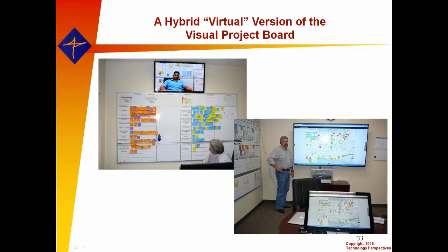I've seen some boards where even the person who set them up has no idea what everything means. So here's a simple rule of thumb. If after a week or two of using a project board, anyone on the team has to ask the question, what color of Post-it are we using for that, it's too complicated. So give it a couple of weeks because there's a little bit of a learning curve there.